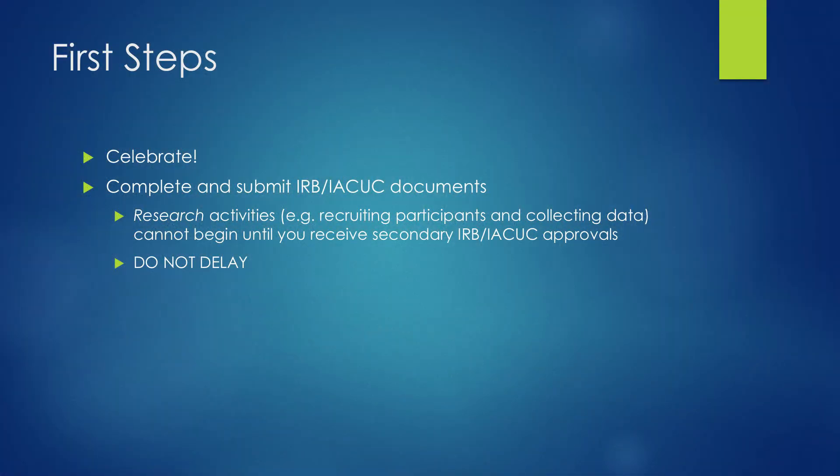The first thing you do is to complete and submit your IRB or your IACUC documents. That's the first step moving forward. Any of your research activities — recruiting participants, doing any of your data collection — can't begin until you get not only the initial IRB or IACUC approvals, but also the secondary ones. So don't delay. Get that done. That's your first step.